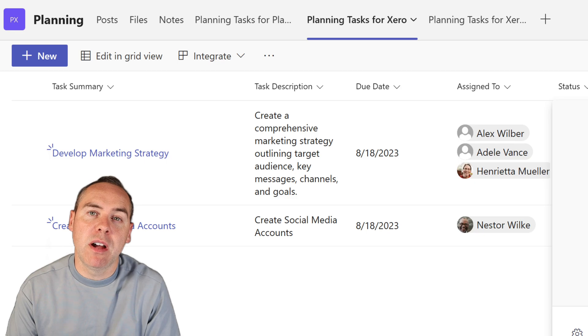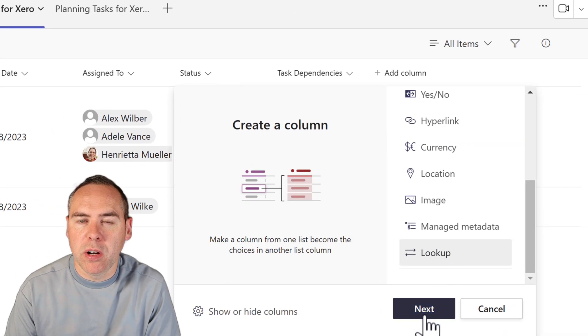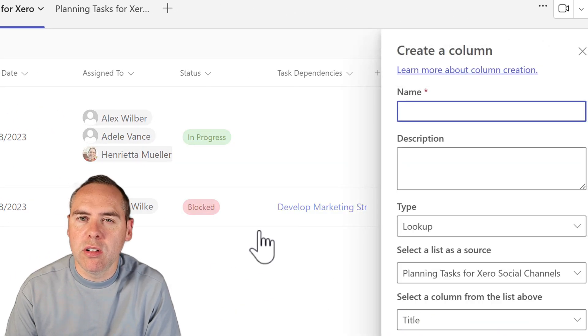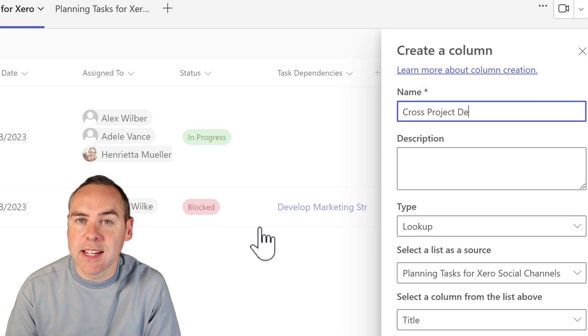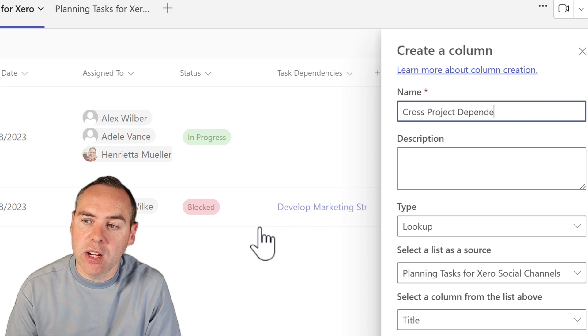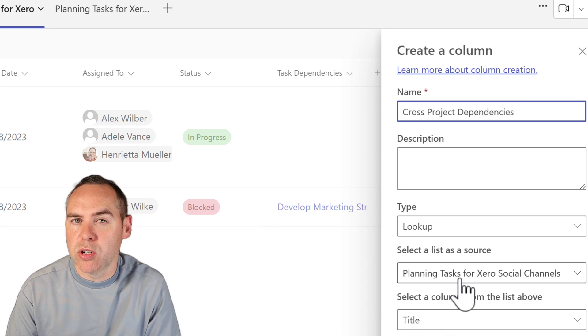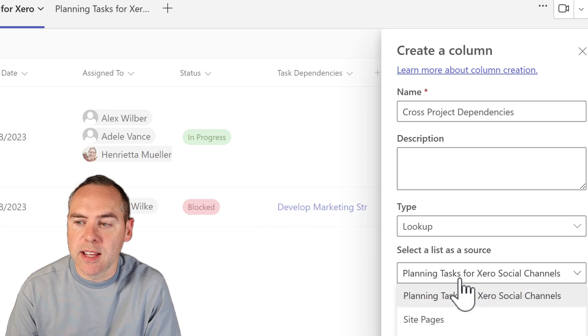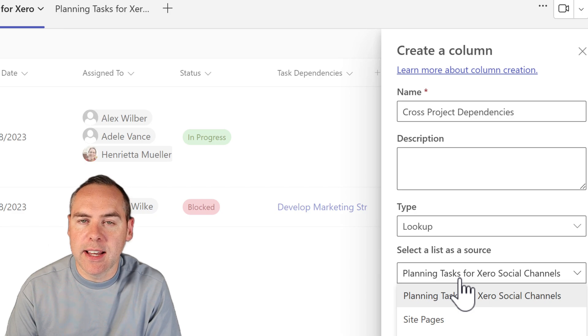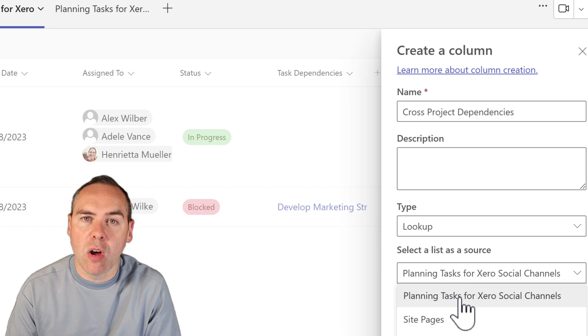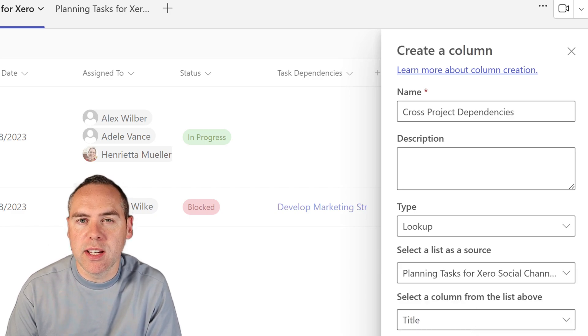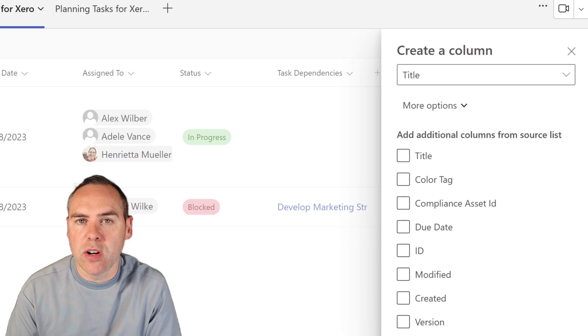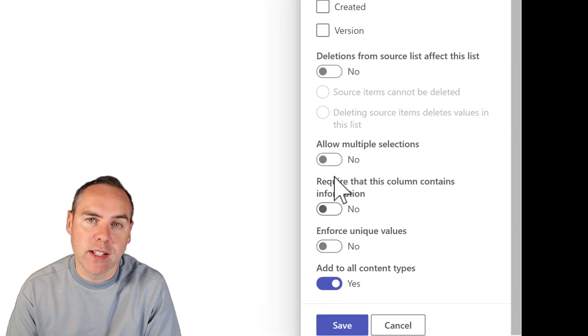But in this scenario, what I want to do is create a dependency in our original plan to this task, which sits outside of that task list. And I can do exactly that. Once again, with the power of a SharePoint lookup column, we're going to go and create a new lookup column on this list. And inside of that, I can define as cross project dependencies. This time, selecting the list I've just created with that whole new task list. And once again, selecting the title and multiple actual items. When we save that,